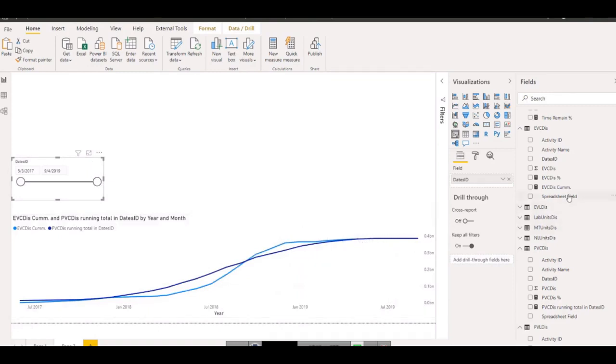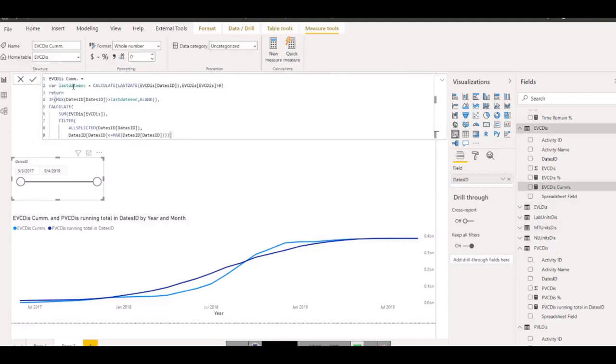So see, now it is changing, but I don't want this date to be shown, this line to be shown. So for that I said to DAX that store a value for me as a variable. The value says the name, you can give any name, XYZ. The name says last date earned value cost, and the condition is calculate for me last date of this table where the earned value is present, means the user has actual progress available. So actual progress is there, so calculate that.